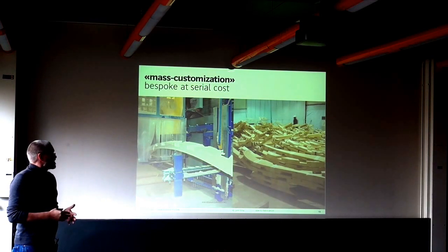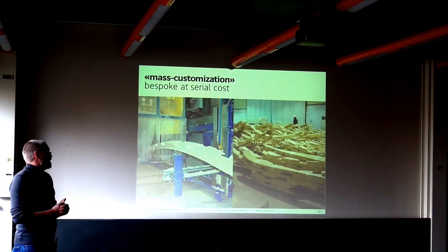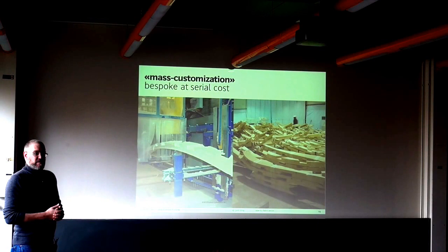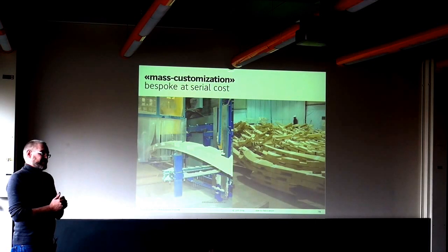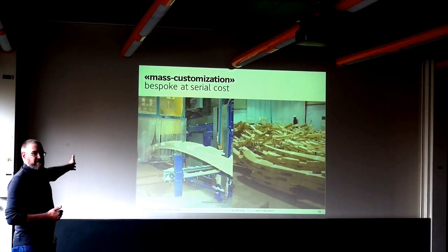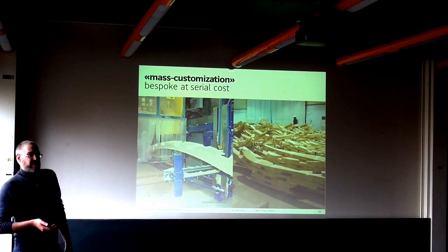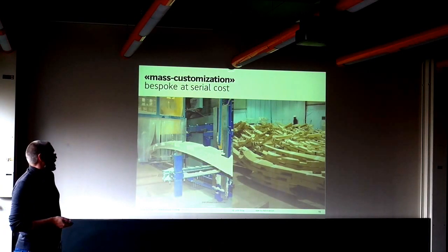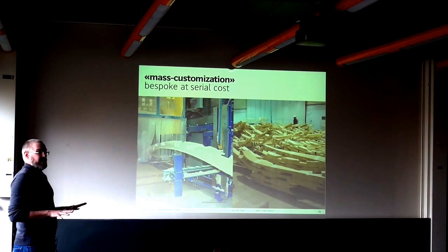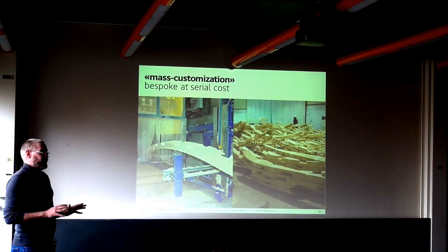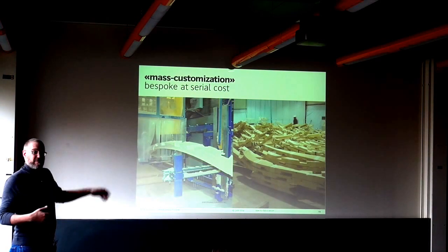And our task in those projects is to set up sort of a fabrication chain that would allow us to mass customize those components. And fortunately, we're working in architecture. That means we don't have to find 3,500 clients to buy one of those. We have to find one client that buys 3,500 of those, which means investing a few weeks into engineering and even software development in the beginning actually pays off within one project. We're actually developing a complete fabrication chain, including the software that does the planning for the project, and then we throw it away afterwards. Not the machine that's doing that, but the software that's doing the planning.